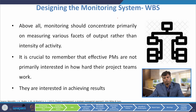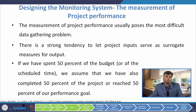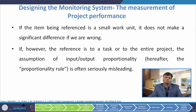Monitoring should concentrate primarily on measuring various facets of output rather than intensity of activities. Effective project managers are not primarily interested in how hard their project teams work — they are interested in achieving results. The measurement of project performance usually poses the most difficult data-gathering problem. There is a strong tendency to let project inputs serve as a surrogate measure of output — if 50% of the budget has been spent, we assume 50% of the project is complete. If the reference is to a task or the entire project, the assumption of input-output proportionality is often a seriously misleading concept.